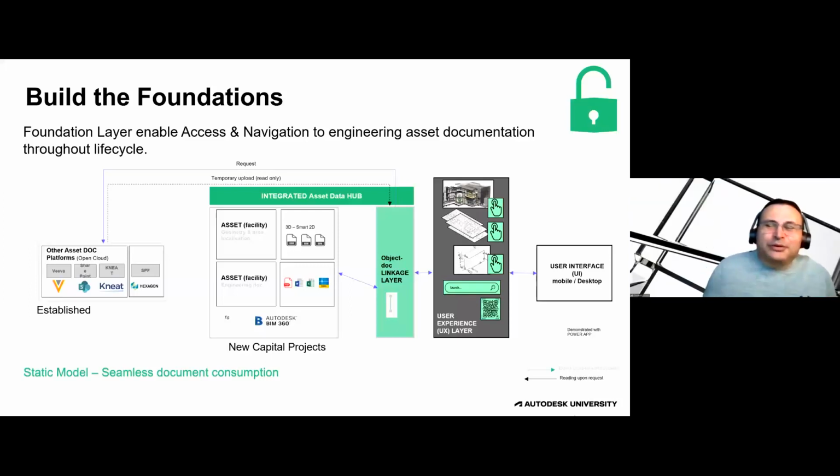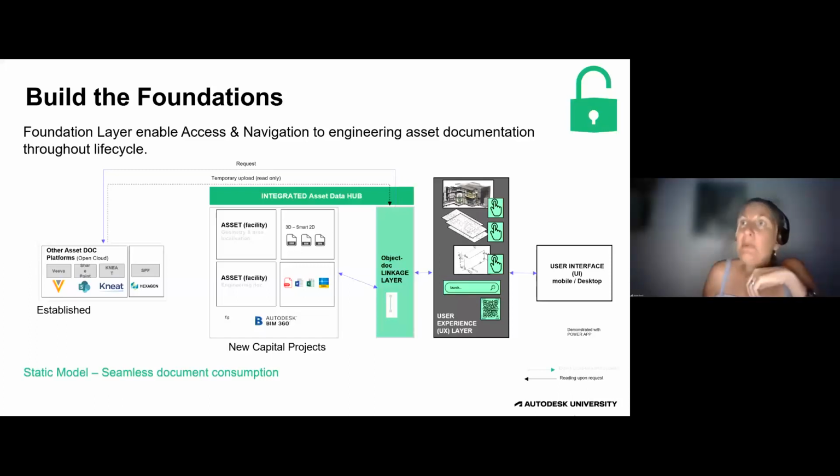Yeah, right. And the beauty of it is that this linkage could be established after delivery, so you don't need to pre-establish the link during delivery, by using just smart data ingestion and knowledge graph technology. Yes, and we want to test this pathway because we want to limit the change management to our supply chain. So we just want them to be disciplined enough to put data into a central space, using a naming convention and the tagging. And hopefully then we can have the tech people do the rest. So the most important point: every component needs to be tagged in a standard manner.